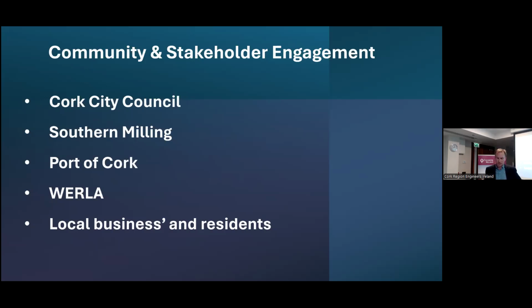From there, we maintained transparent communication with key external stakeholders. Cork City Council, especially Anthony McCarthy, played a critical role in agreeing the traffic management and hoarding layouts to support safe public interface during the demolition. The local residents committee was engaged early, and we continued to work closely with them throughout the works, keeping lines of communication open and proactive.